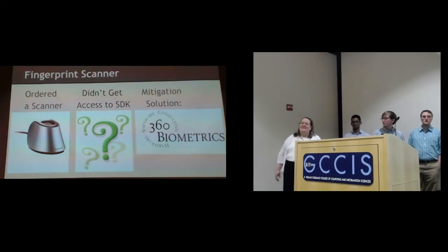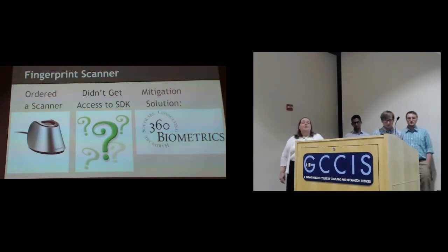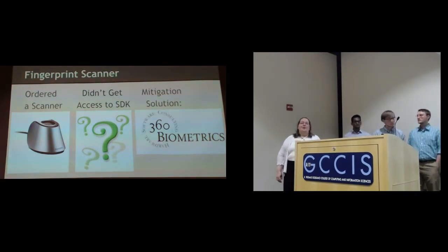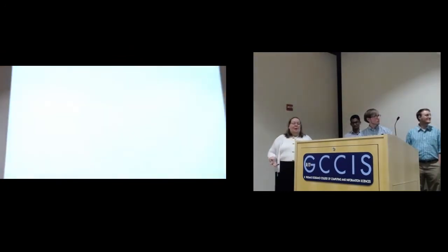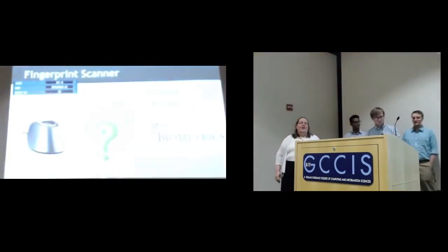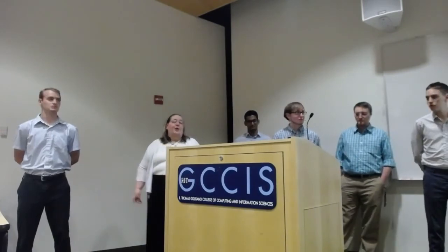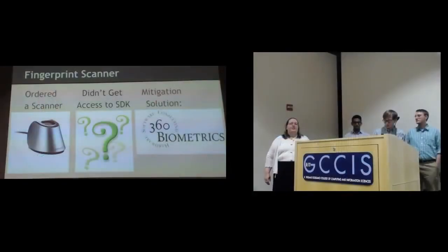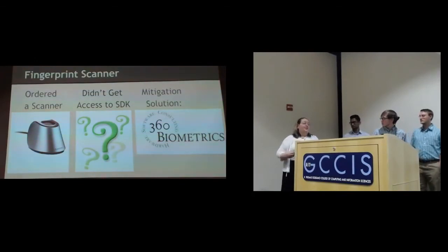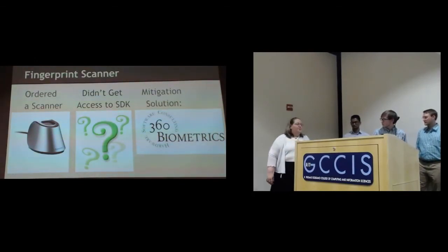As it turned out, we didn't get access to the SDK, so we were unable to develop with it at all. So we followed our mitigation solution, which was to set a hard date by which we needed to find another solution for the fingerprint scanner. The solution we found was working with 360 Biometrics, and they're assigning a dev team that's going to alter one of their applications that's very similar to what our session application was going to be, for use with our system.